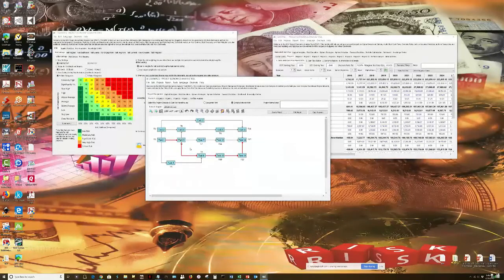So it tells you that what's going to kill you is task 1, 3, 8, 10, 13 to 14. So if you try to mitigate your risk, those are the tasks that you should be spending time on, that you should be analyzing, and you should try to mitigate the risk of the uncertainty on those things. And again, this is extremely easy to do.